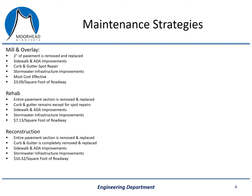The next type of project is what we call a rehab. This is where we will replace the entire pavement section but leave the curb and gutter largely in place. We will do spot repairs on the curb and gutter and make ADA updates and storm sewer improvements. This project is more involved than a mill and overlay and, on average, costs a little more than $7 per square foot of roadway — a little more than double what a mill and overlay costs. A reconstruction is where we completely replace the pavement and the curb and gutter. This is the most complex type of project and typically costs a little over $10 per square foot of roadway, more than three times what a mill and overlay will cost.